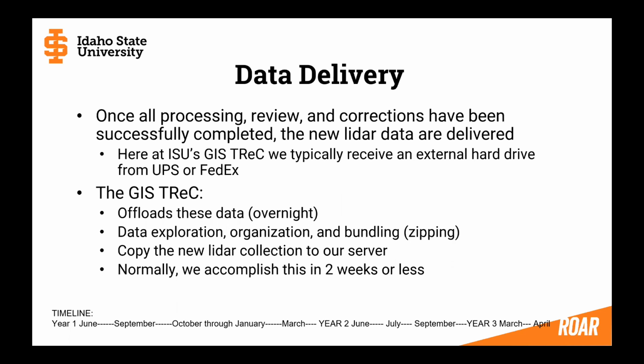Here at the GIS Center, we're going to offload these data. It may take us overnight to get that done. We'll explore that data, organize it, and bundle it, zip it, to make that as small as possible for you to get it. We'll then copy that new LiDAR collection to our servers, and we can normally accomplish all this in 2 weeks or less.